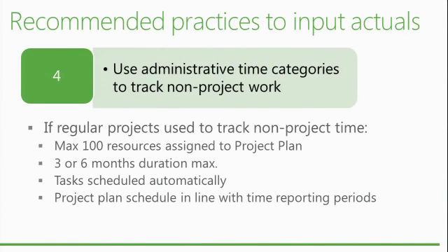Another thing is, in 2010, you have a new mode called task manual scheduling. I don't know if you have used it. Has anyone used it? It's a new thing that requires some explaining to a lot of schedulers because they don't understand what it is. They want Project to be the scheduling engine that calculates all the time. They don't want to have to tell the scheduling engine, now it's time to calculate, to recalculate everything and show you the impact of the update.